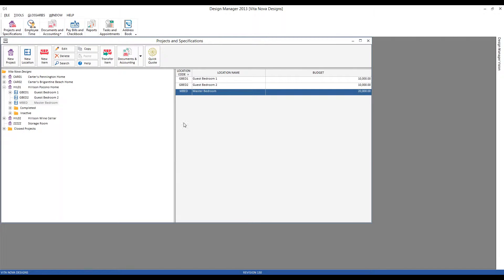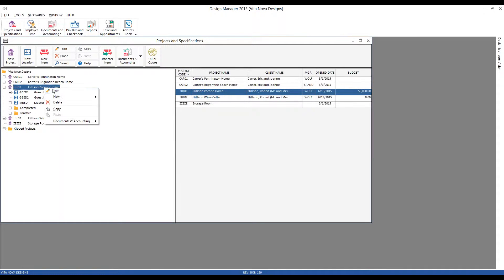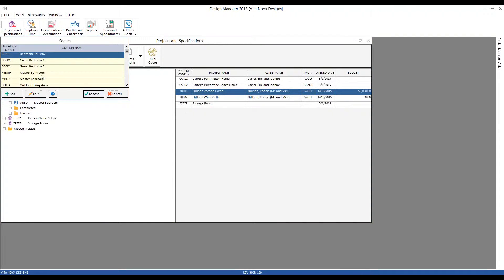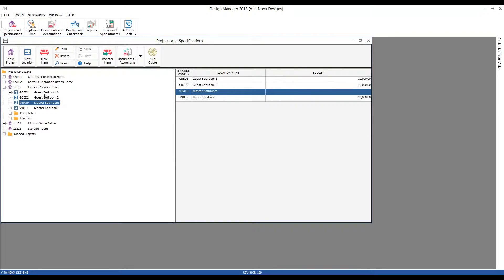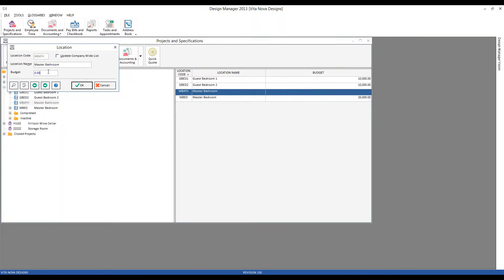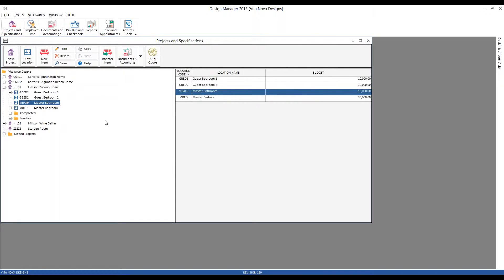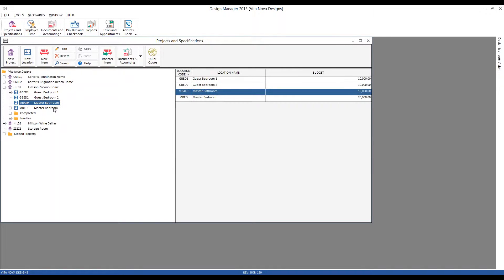Let's create another location for the master bathroom, and let's go ahead and input the remaining $10,000 of our overall budget. Remember, a location within the project doesn't have to be physical locations like we have for the guest bedrooms and bedroom and bathroom. It can be conceptual locations such as time, design fee, reimbursable freight, etc., all of which can have their own budgets as well.